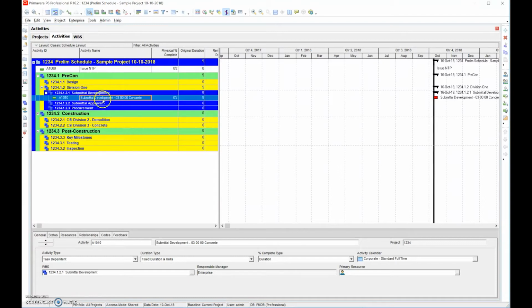See here we say submittal development, and then it has what the submittal is going to be. We can say develop submittal, verb noun, and then we specify exactly what it is. Having an accurate naming structure is important. Verb noun makes it clear and provides clarity. Just saying submittal doesn't say exactly what it means. It needs to be very, very specific.